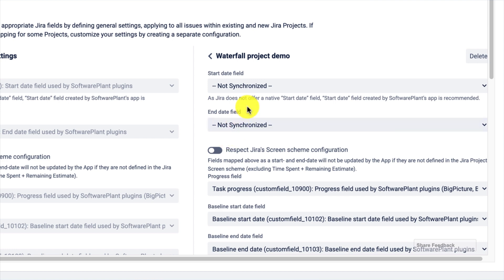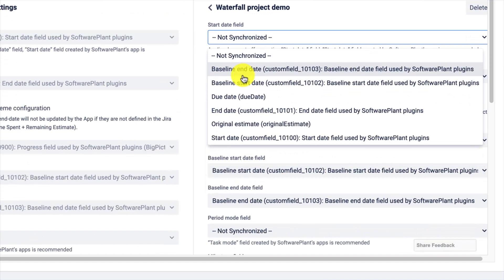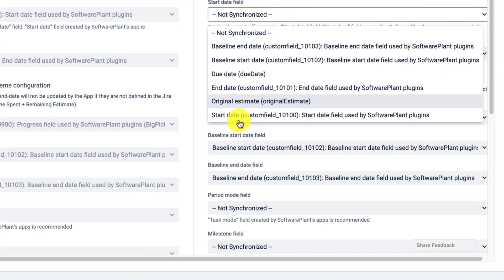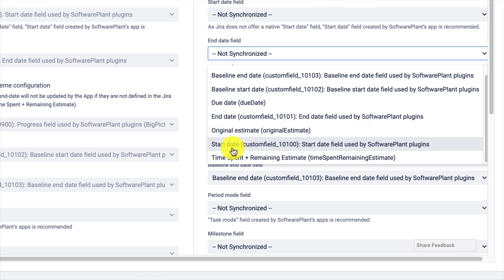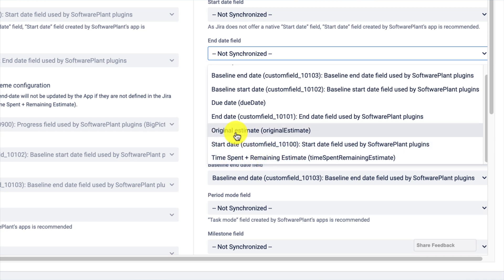Alternatively, you can pick from the list of available fields. Three types of fields are supported: date picker, time type fields, or time tracking fields such as Original Estimate and Time Spent plus Remaining Estimate. The Original Estimate would be the effort in that case.